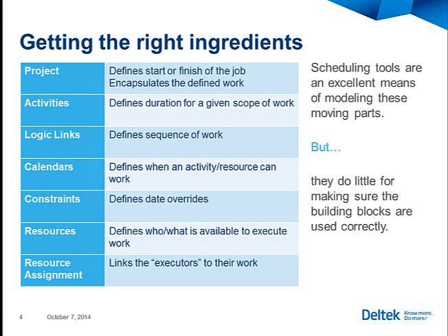980 type schedule. This is something I'm always looking for when I'm validating schedules, because we could have a realistic plan, but if we have unrealistic work times, if we're counting on resources being available during times when they're not at work, we're creating a recipe for failure.